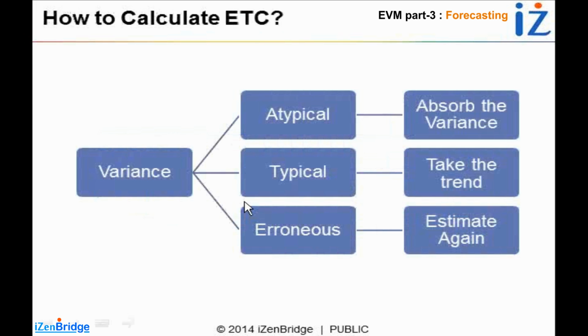Initially, whatever we have planned, we think we should factor in the current variances. The cost variance is going to be the same in the remaining period of the project. In that case, we take the current cost performance index into account and increase or decrease the complete budget of the project, or the remaining budget of the project, according to our cost performance index.